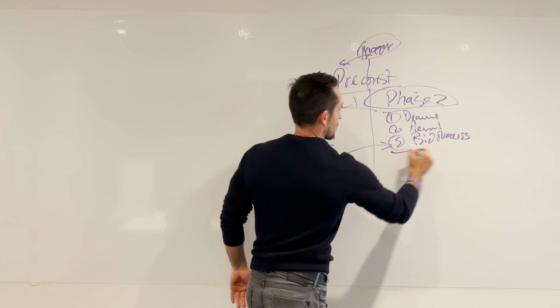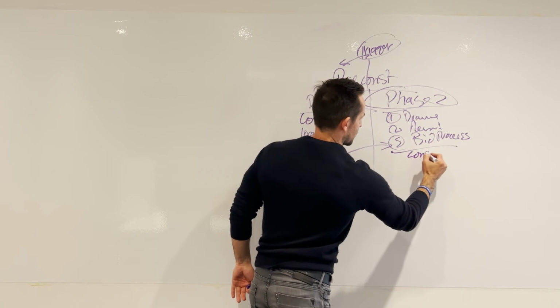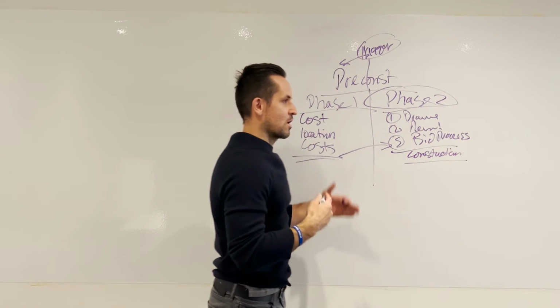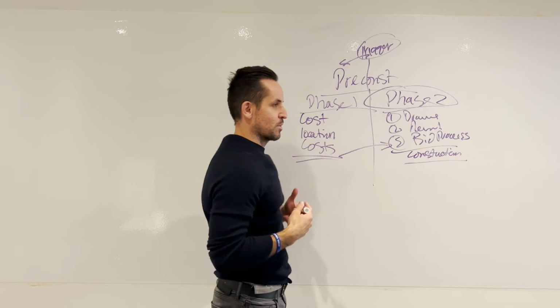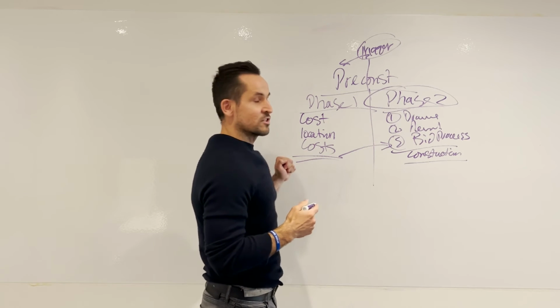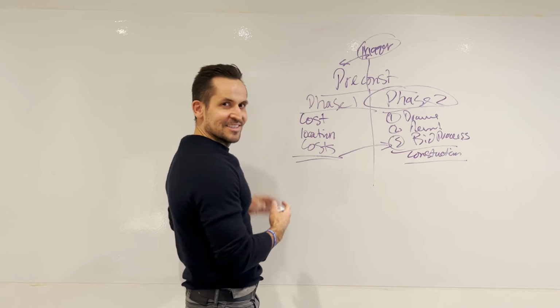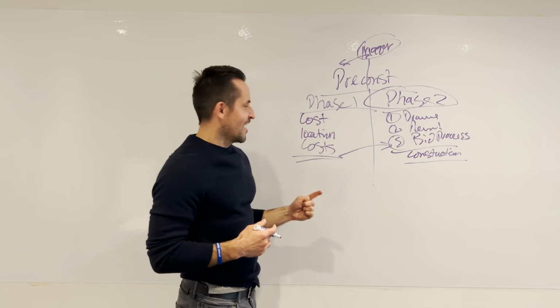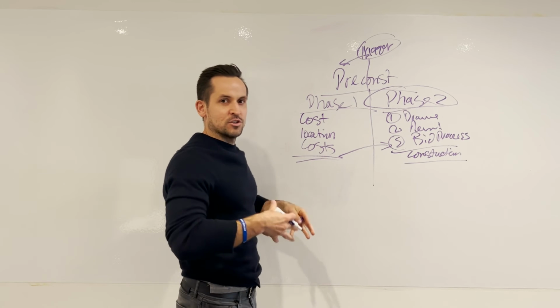And this is where a lot of times your construction costs become known, because you're bidding out with contractors and you're getting other suppliers, subcontractors involved and everything else. So it's super critical to understand that pre-construction is split up into 2 phases, and to understand, is it a viable location, 1, and what is the cost on this location to do construction?